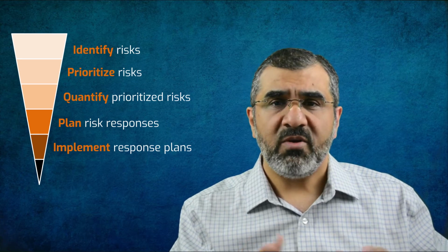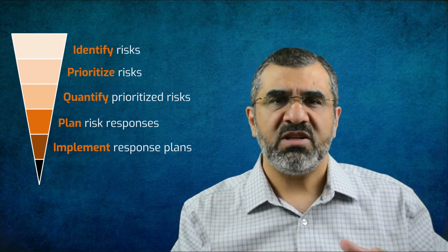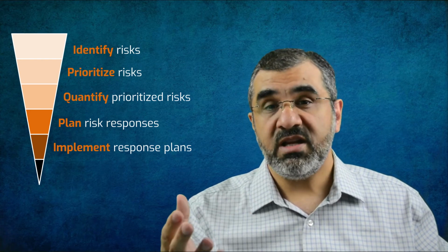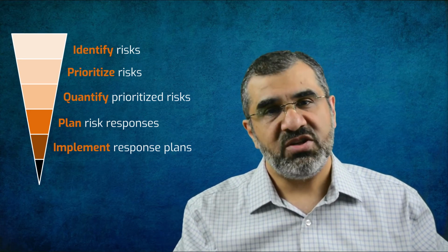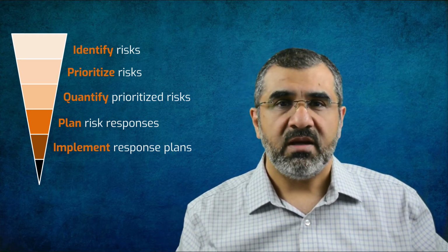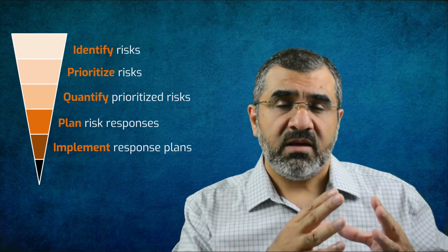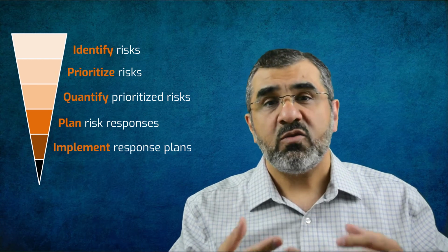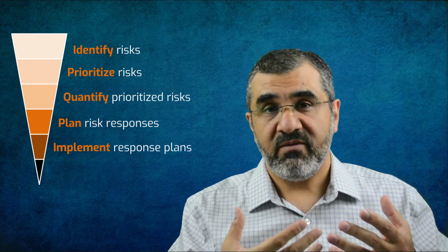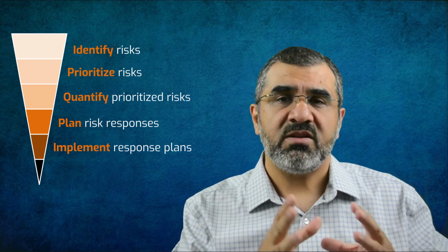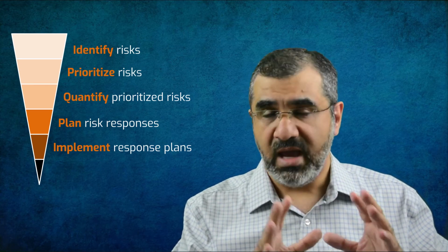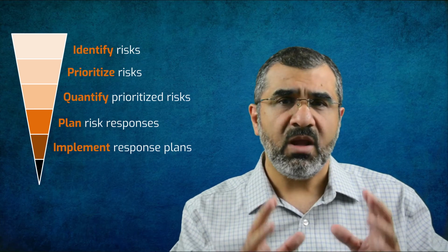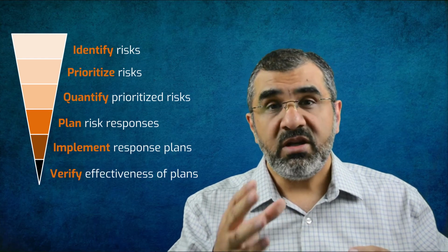On a small project with very few team members, the project manager may be the owner of all the planned risks, but in larger teams, the responsibility is shared by various team members. Then the project manager in those cases mostly focuses on reminding the risk owners to keep track of the risks, and when a risk occurs, the project manager ensures appropriate resources as per the plan are engaged to implement the response. Now comes the 6th step, monitoring the risks.